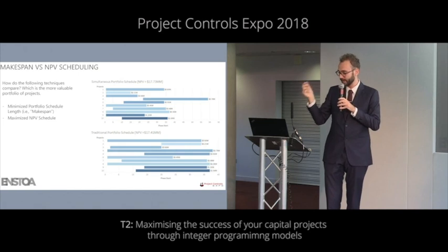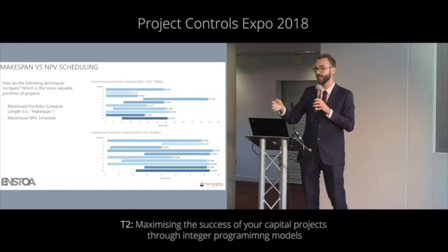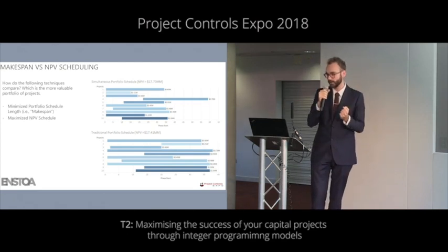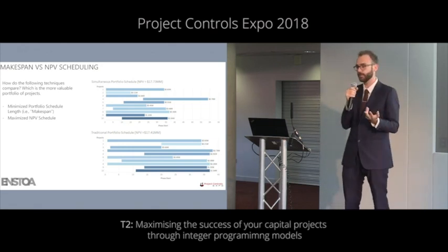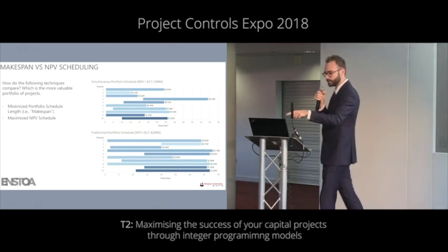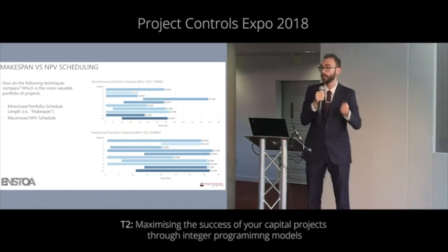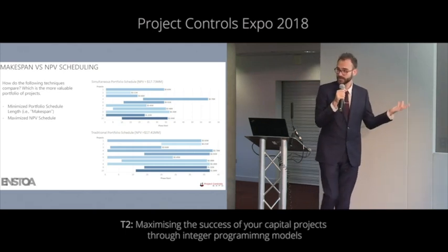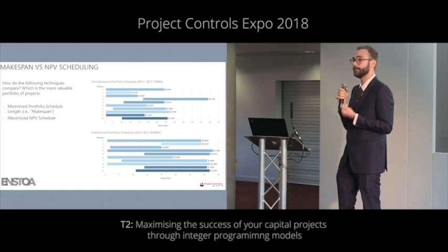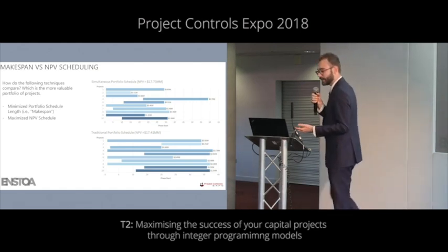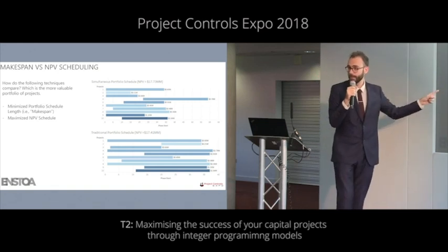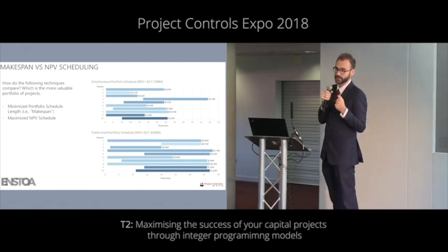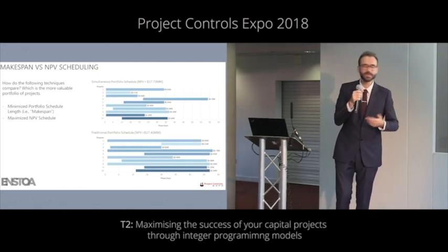And we know that because I've checked to make sure, and I've designed this example, but we know that as well by looking at the solution that the net present value model drives them to completion earlier. The net present value model doesn't care that project 4 is a long one. All it cares about is that if you finish projects 2, 3, 9, and 10 early, you earn the most money, so it's going to schedule that. And we see here that the net present value model generates 17.73 million and the scheduling model generates 17.4 million. So just in this 10 project example, there is a $300,000 surplus waiting to happen by using our net present value model. Imagine the surplus you could get if you run this for 100 projects, for 500 projects, for 1,000 projects. That value is in the millions for sure.